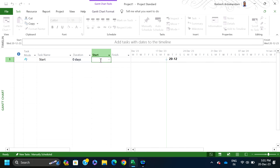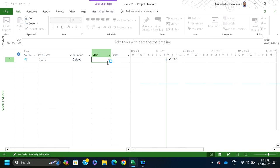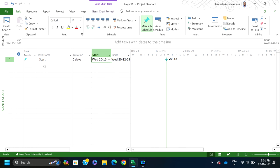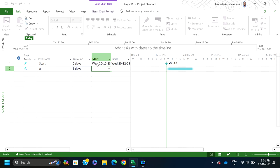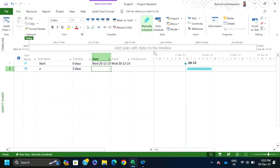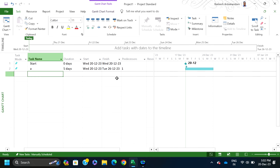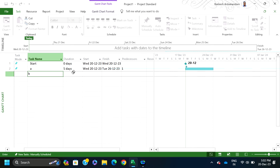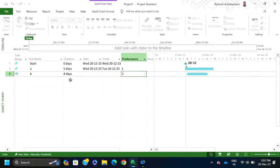When you drag to the right-hand side, there is an option called predecessors. When you type the predecessor as 'Start' and enter 1, it automatically shows the starting and finishing date. Task B has a duration of 4 days and predecessor is Start (1). When you click anywhere, it automatically picks the start and finish times. Task C has a duration of 6 days and predecessor is activity A, entered as number 2.